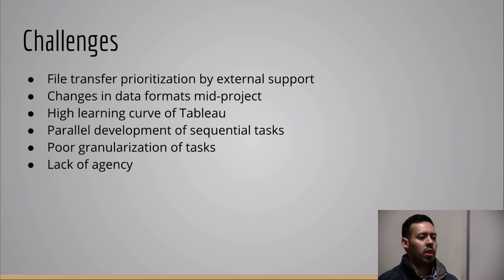We also faced the challenge of learning how to use Tableau. Tableau is the data visualization software that we just showed you. And no one in our team had experience using Tableau because it is an enterprise software. So it took us some time to learn how to integrate Tableau effectively with our data. And another issue we had was how we assigned tasks. Our tasks ended up being sequential, and because of this, one task had to be completed in order to start another task. And so we created a bottleneck in our productivity.